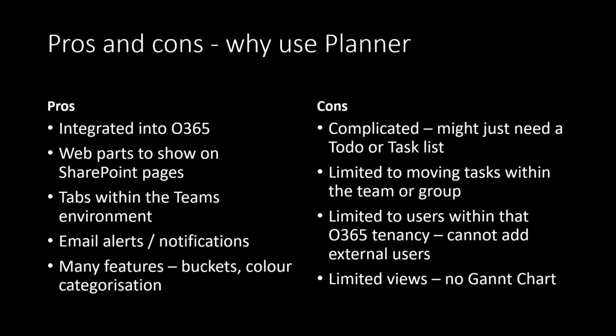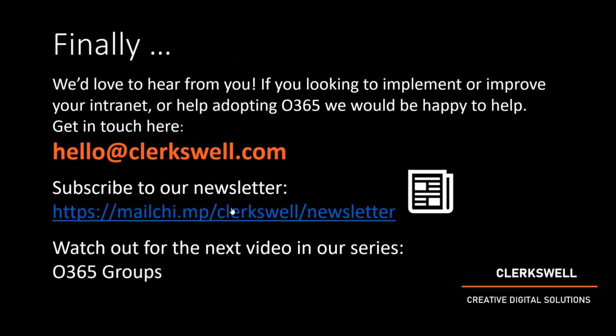That might be, on the flip side, a con for you. It might just be too complicated. You might just need a to-do or a task list to manage a short list of things. You are limited to moving tasks within the team or group, so you can't export a task into somebody else's plan. And you're also limited to users within the Office 365 tenancy. You can't yet add external users into your plan. There are limited views, so there's no Gantt chart. So it might be that this is not quite sophisticated enough for you.